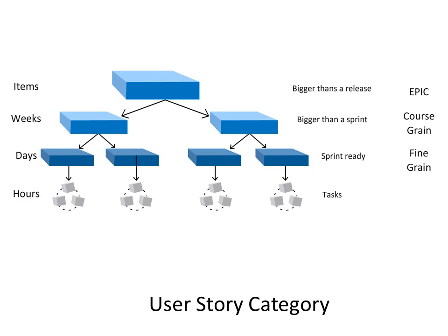So user stories, like I was explaining, come in different sizes. If you define it in a very large, more like a release kind of a thing, like a month-size work, it's called an epic. When it's broken down, it's called coarse grain, which is generally bigger than a sprint, but might be a week or half a week kind of measurement. And then they are broken down further to fine grain. So these are basically stories that can be pulled for the sprint.